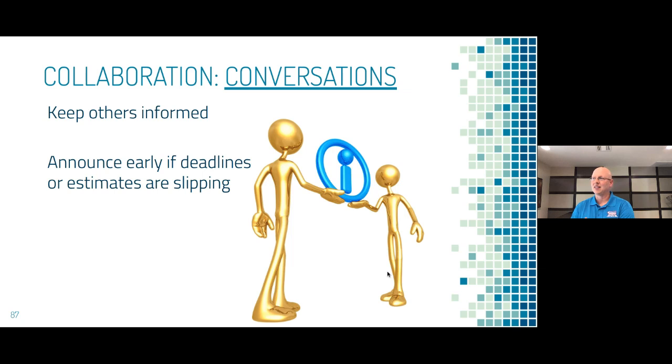And how this applies, the example that I use for my students, is say, for example, you're at a company and they have a hard deadline. You might not know that they have the whole legal department lined up on that day to review the product to go out to the public. You might not know that there's a huge marketing campaign going off right now that is going to promote that product on that day. So if you say on the day of the deadline, "Oh, I'm sorry, we need a little bit more time," you have affected a massive amount of downstream resources.